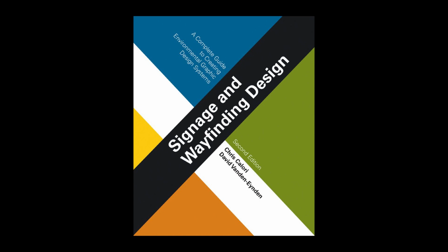In the architectural profession, this phase of the design process is also often termed construction administration, CA, or simply construction phase services. Note that the use of the word administration is somewhat misleading because the overall administration of the contract, including payment of subcontractors such as sign fabricators, is primarily the responsibility of the client's contract rep, not the architect.